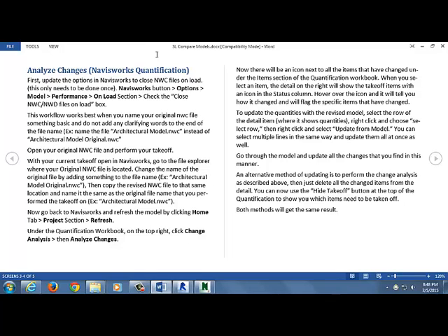And now you could do it when you open it, or you could do it now, but you need to change the name of your original NWC and make it different, so you can add the V1.1 back. You could also just delete it because you have a copy of it in your original folder. So now you're gonna rename it. Just add something at the end that says the original or version 1.1. Now rename your 2.1 to what the original one was, so take off the 2.1. So it thinks it's just that same file.